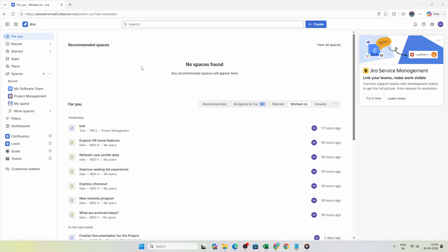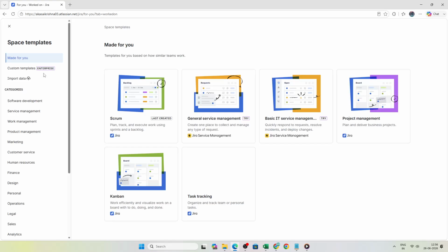In today's video, I'm going to teach you how to create a Scrum project in Jira. To get started, open Jira and look over to the left-hand side of the screen. From there, select Projects or Spaces, depending on the layout you see in your version of Jira. Once that section opens, click the plus or Create icon next to it.